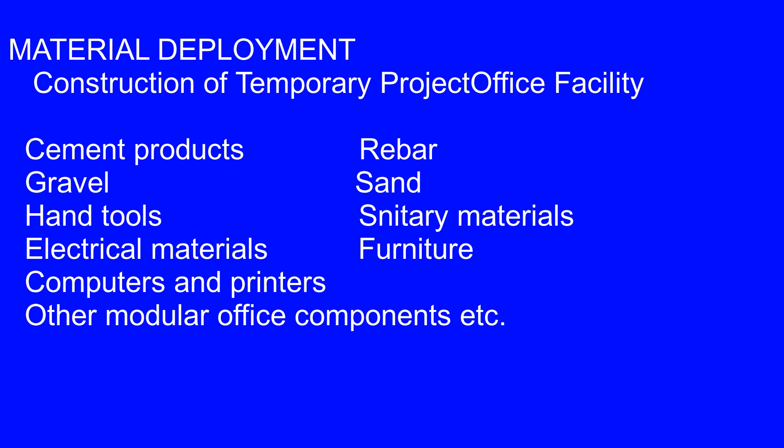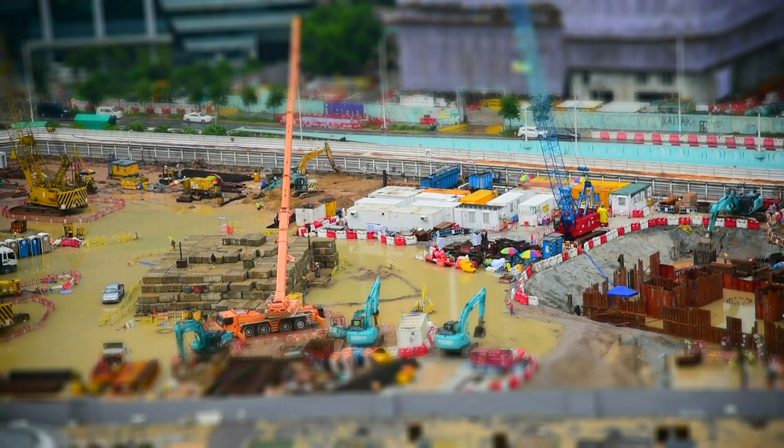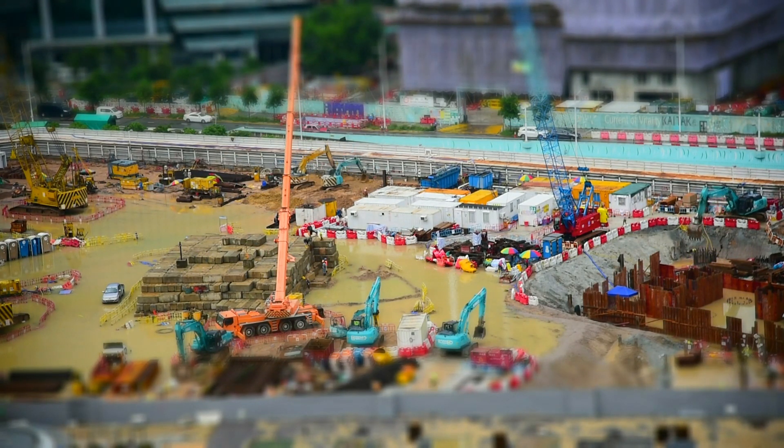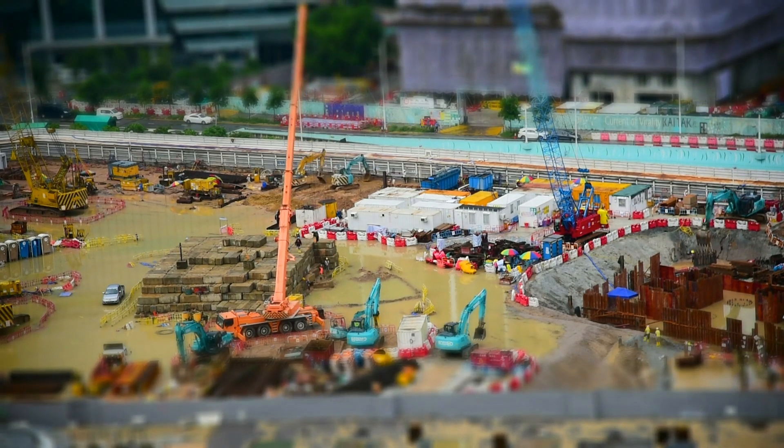For material deployment, you need materials for construction of temporary project facilities such as cement products, reinforcement bar, gravel, sand, hand tools, sanitary materials, electrical materials, furniture, computers, printers, and other modular office components. After completing the storage and handling area, you may also need to mobilize materials required for actual project execution, especially bulk materials, rebar, scaffolding, and so on.